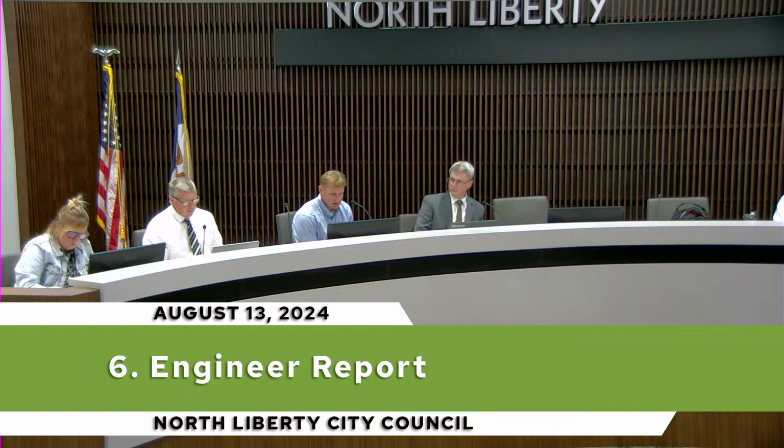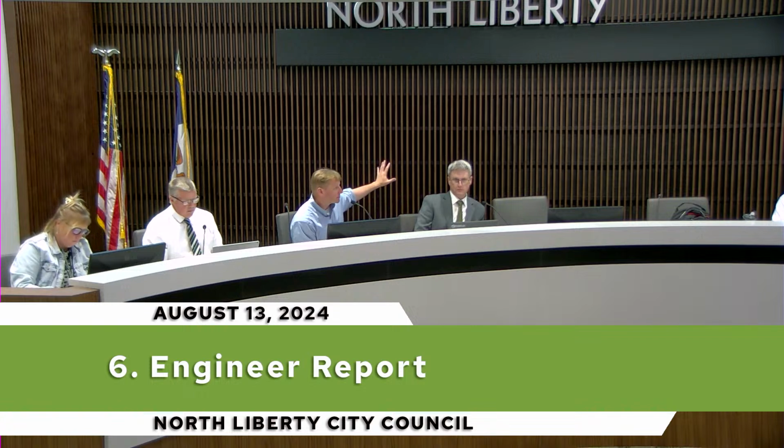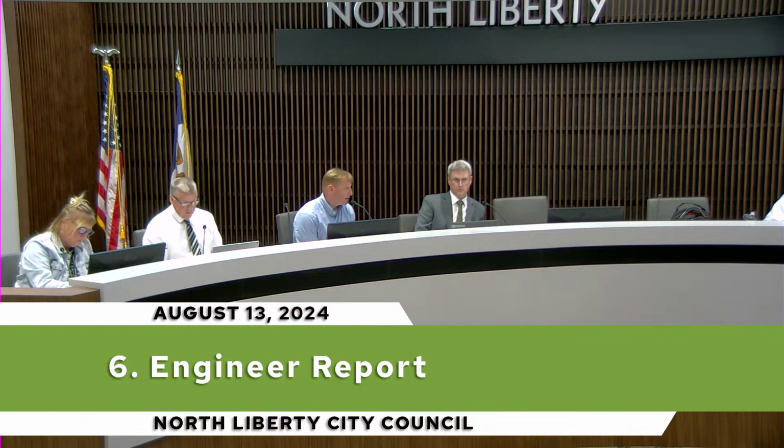All the new traffic signal pole footings are in place. The contractor is working on grading the sidewalks at Kansas Avenue, and those sidewalks are going to be poured shortly after that grading gets done. And then they're going to kind of flip their focus over to Jones Boulevard because there's a lot more utilities and things to work around there. So they're trying to get Kansas sort of up a bit, and then they're going to focus back on Jones. And just to note, these projects will impact the roadway a little bit, but that's still going to be a ways off this fall.